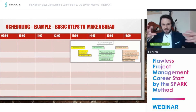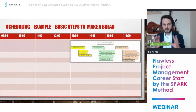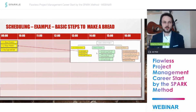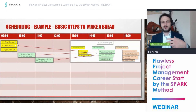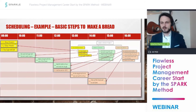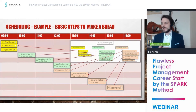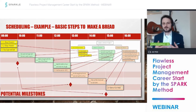We are making bread and breaking it down into manageable, actionable items. Then we put these into time frames. First we buy ingredients — we cannot start making bread without them. Only then can we mix the yeast and sugar. Only after that do we make the dough with the flour, then set up the oven, and so on. Each activity can only be performed when the previous one is completed. All these activities together might take just 30 minutes, but because of the dependencies, the overall project can last from 9 a.m. to 4 p.m., depending on how long you let the dough grow.